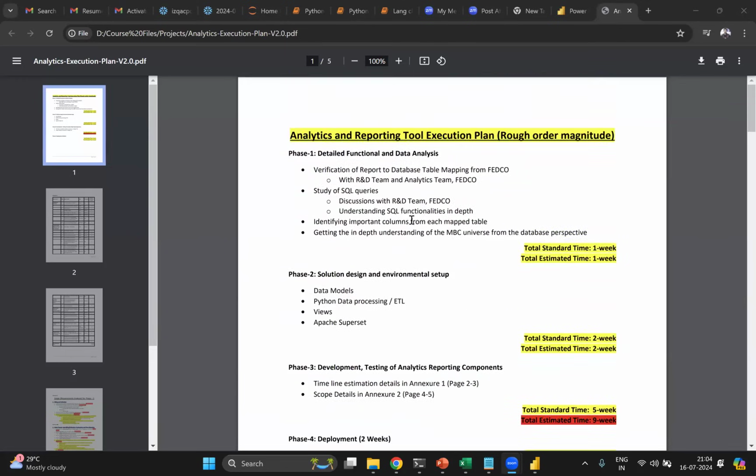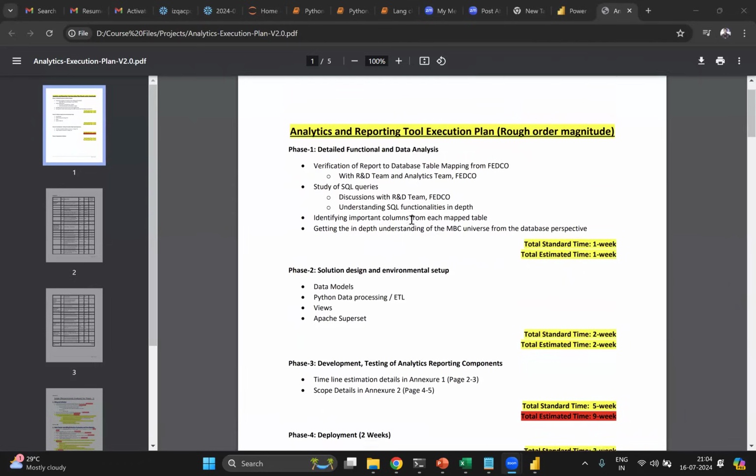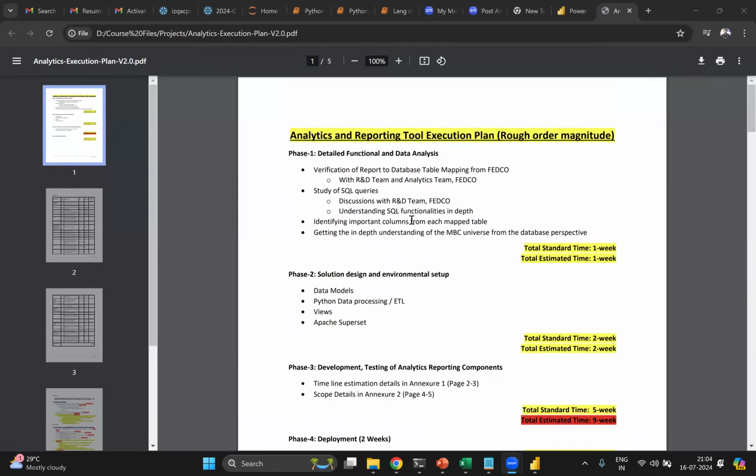Once we are able to get a resource, the interview process and all this takes 1 month to 1.5 months. There is the interview process, notice periods and all that. Once we get that candidate, we again want to provide training. For this kind of project, mostly we don't wait that long. We will have our resources, push the project to them, and start doing it.